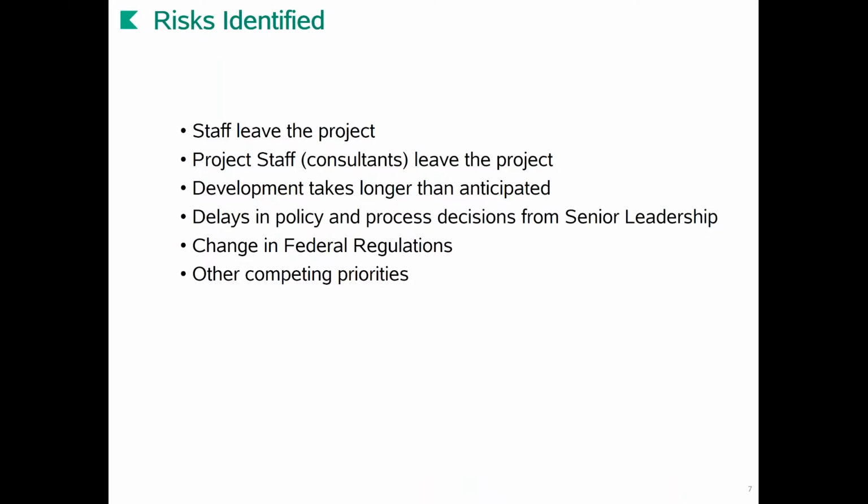And competing priorities. I know of a school right now who's trying to get to Kuali in the cloud. And they're also embarking on a new financial system. And their senior folks basically said, if you're not live by X date, your project is done until FY19, because our financial system will take priority over your project.